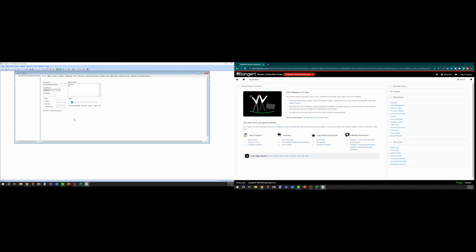Okay. I also know that I do not want to approve this yet because you don't want to approve until the very end. So there's some certain rules and formatting that you need to follow when setting these up. But I'm just going to work down to the next tab here. And this is where you would come in and say what type of worksheet view. So when you're entering your progress billing for that month, what view do you want to use? And typically people use what's called the progress billing view. So you need to fill that out. You'll also notice here you can distribute to, just like on that AIA form. State of, county of, those show up on the form. So it's a matter of knowing which field you need to fill out in which area.